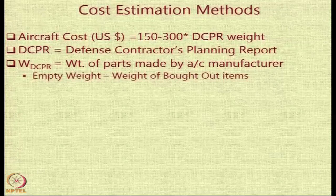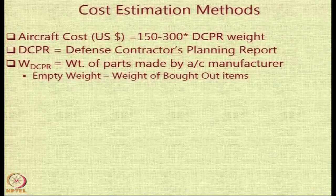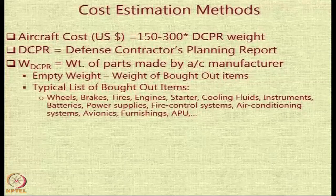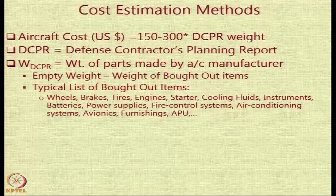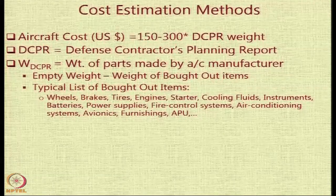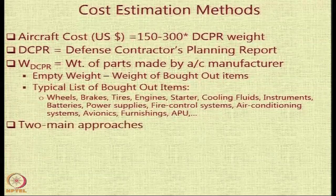So it is basically the empty weight of the aircraft minus the weight of the various bought-out items. There is a huge list of items which a manufacturer buys from ancillary suppliers and does not necessarily manufacture themselves. One estimate is that you multiply the DCPR weight by a number like 150 or 300 depending on the aircraft type, and you will get a basic estimate of the aircraft cost.